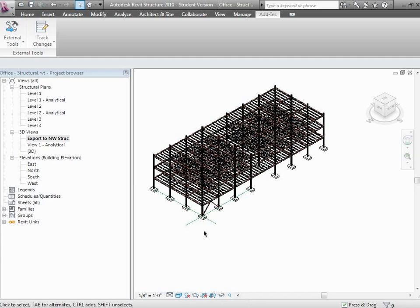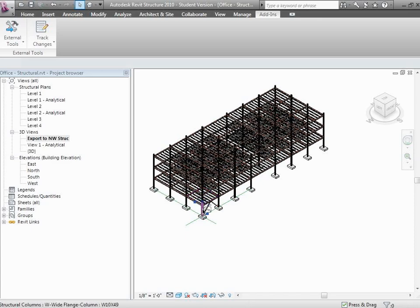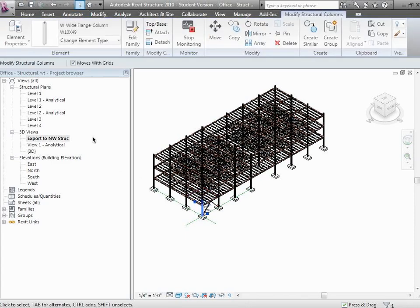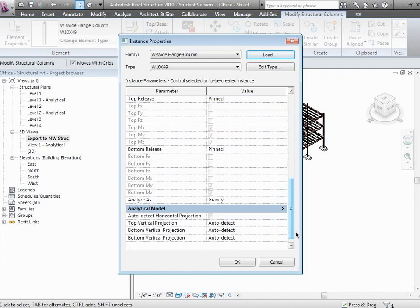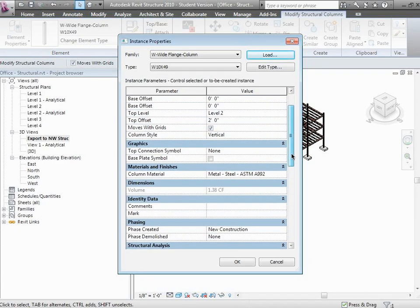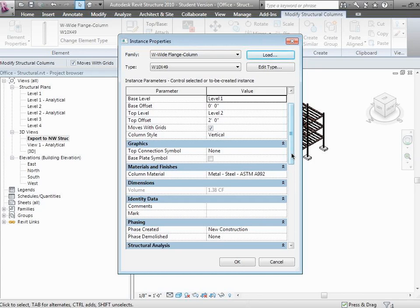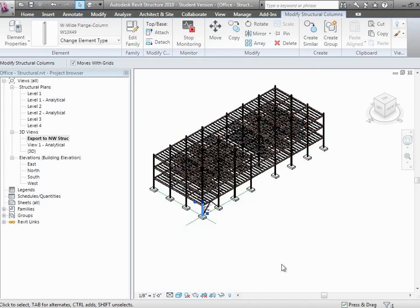For example, this column over here on the first floor level has all these different properties associated with it, all of which I can grab out in Navisworks. It sure would be nice if I had a field over here where I could map the task ID to that element and just do it right here. You say, but there isn't one of those things. I don't have any field available to map the task ID, but the secret is you can create that if you want it. Let's show you how you do that.